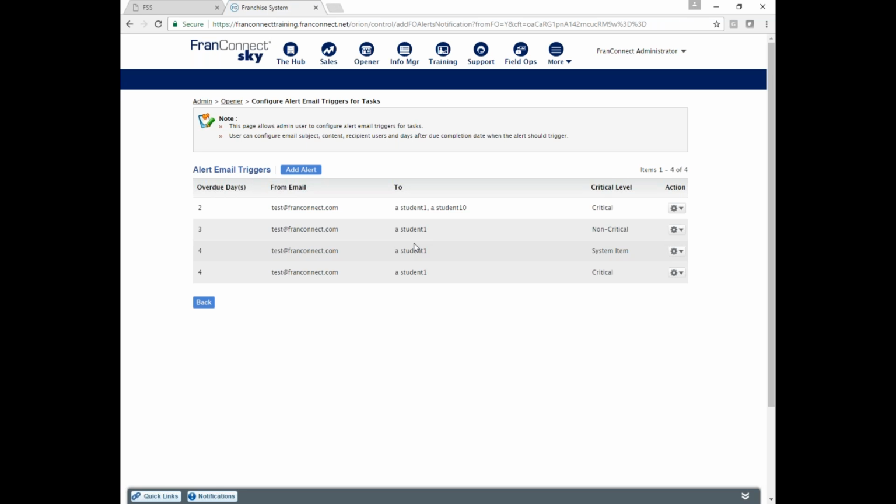So I'm going to get an alert for the beginning and the end. Inside the task, I can say send a reminder before the beginning and before the end if I want. I can also send an overdue reminder at an interval for every task, 5 days. And then I can set additional escalation alerts at any number of intervals that I define. So there's a lot of ways I can get reminders from them.